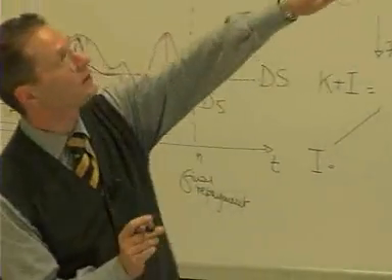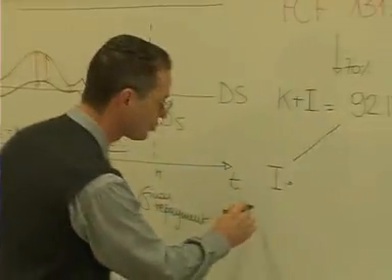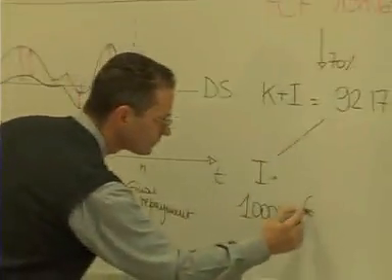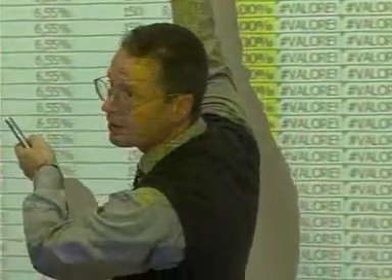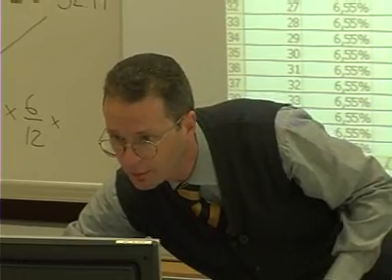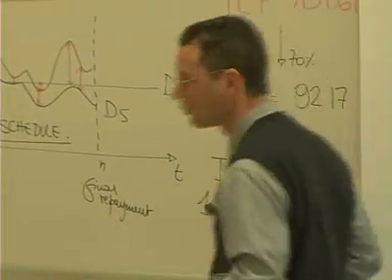Okay? And so, in the first period, the outstanding debt is 1,000. I can use 1,000 times the time. Here we are talking of semesters, and so it is 6/12, or 1/2 if you want, because we are talking about half a year. So 6/12 times the interest rate that is available for the first semester, and so 7.45. You can see the interest in this column. It is exactly this column. So 7.45% times 1,000 times 1/2 returns the value of the interest for the first semester, whose value is 37.25.